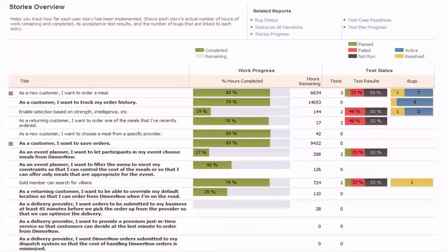And that's a great stat. Most developers you talk to, you ask them how much of the work they've done, and they say they're 80% done. So that matches what I'm seeing here. But then you also want to know, if you're done, what's the quality of that? And by using Microsoft Test Manager and some of these automated test solutions, you can start to measure that as well. So I can see that this one's 80% done, and we have 3 tests, but most of these tests aren't actually passing or haven't been run yet. So I don't really feel that good compared with what you would normally think when you say you're 80% done with something. The next one down, you don't have any tests. And so it's just a way for you to communicate across the entire team.